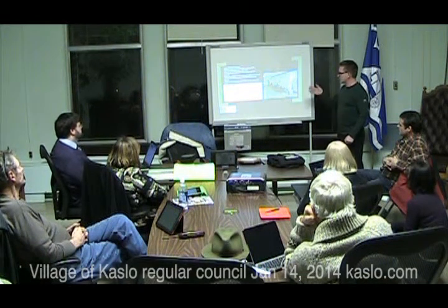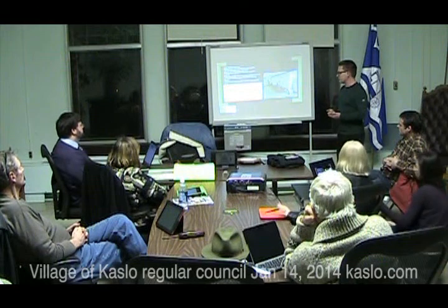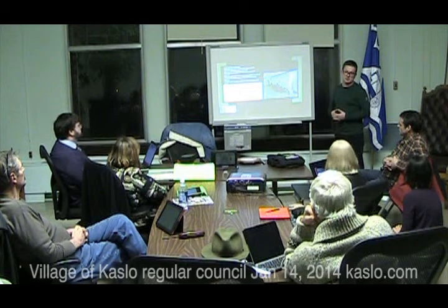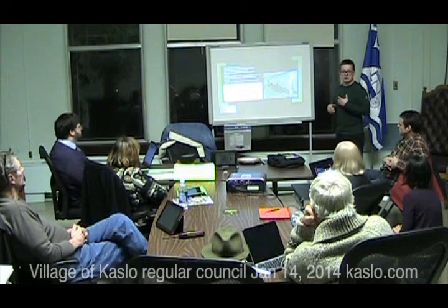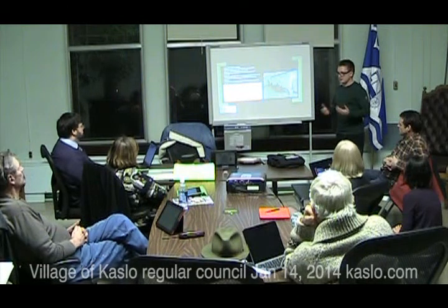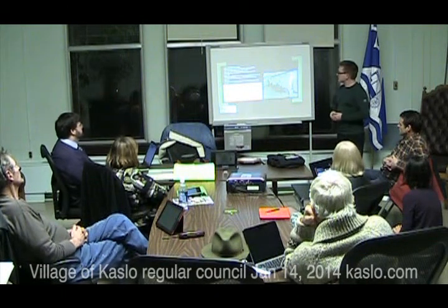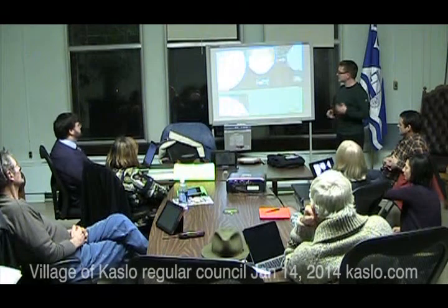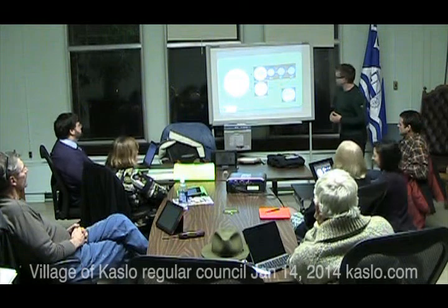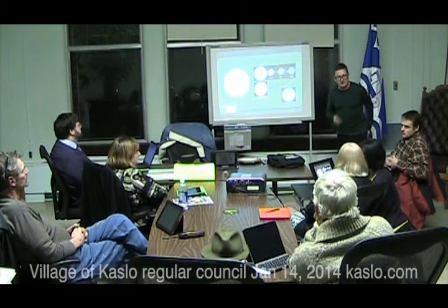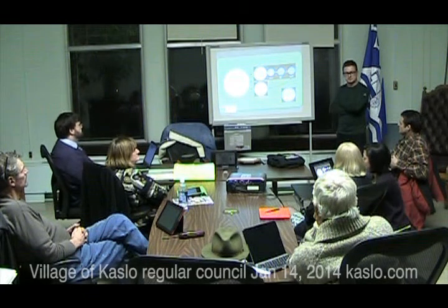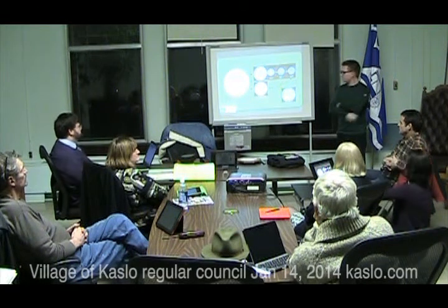But an upgrade like this, including the computerized system and everything, would have a budgetary price, including a contingency, of about $136,000. So this might be something that you could potentially have the funds to do to start the process. I don't know, or apply for funding. We'll go to the next phase of this first option, which is phase 2. It's removal of the geofabric, the existing geofabric, and the sediments or the coarse film on them. Okay, so you can zoom in now.